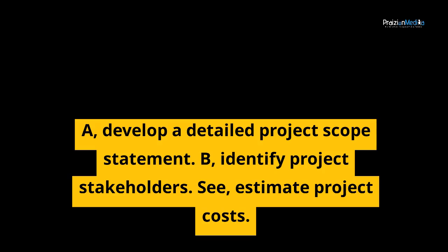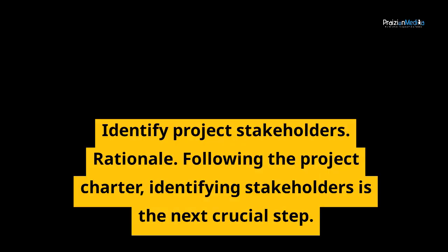A. Develop a detailed project scope statement. B. Identify project stakeholders. C. Estimate project costs. Correct answer B. Identify project stakeholders. Rationale. Following the project charter, identifying stakeholders is the next crucial step.